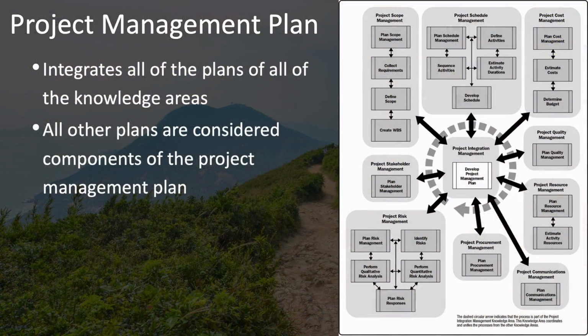Development of the project management plan is part of the integration management knowledge area. This is because this plan integrates all of the other individual plans of all of the other knowledge areas, from scope, cost, schedule, quality, and so on. All of these other plans are considered components of the larger project management plan.